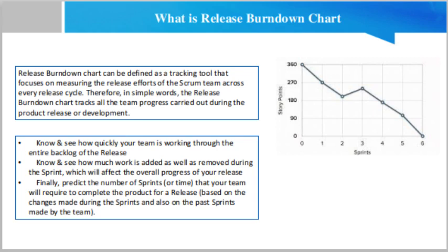Lastly, release burndown charts always rely on good estimation. The ideal effort line is based on assumptions, and whether the real effort line goes below or above the ideal work line depends on the accuracy of the estimations undertaken when creating the ideal effort line. That means if the estimates are inaccurate, then the chart will show grave misrepresentation based on the ideal versus real effort comparison.